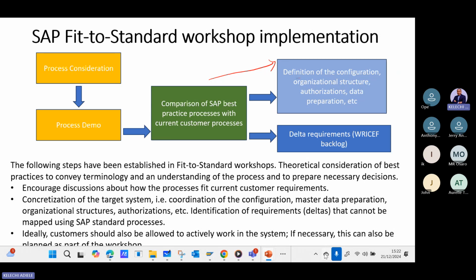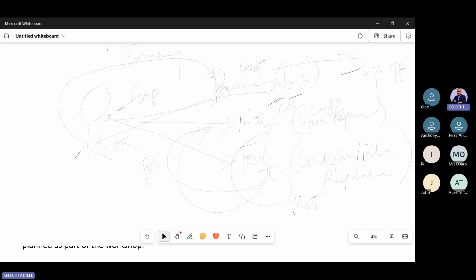Do you understand? What I've shown you now is something that happens at the explore phase. As they are configuring, you are also doing your own work by bringing their attention to the fact that there are some gaps they need to close. And you have identified those gaps. You have made sure that the business is okay and it is within scope. You can also discuss that with the project manager to confirm that this is within scope. Once it's within scope, you have to meet with the functional consultant to confirm system requirements.